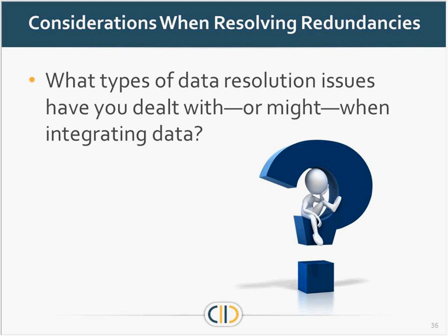We had not included the LEAs. And yes, all the elements were the same and all the option sets were the same and all the data appeared the same. But the process behind that interpreted when they would report the data or what school would be responsible for that, which had never been documented anywhere, and there really wasn't any kind of a process in place for us to understand it. So we were having to rework that report in production, live, and get it out while they were actually working on it. So overall, the project did end up a success, which is good, but we didn't include the appropriate stakeholders in these conversations. So it's not always just the elements and the option sets.